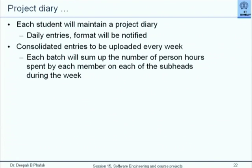At the end of the project, summing up all minutes and hours per activity across team members tells you the total person-days of effort spent. You'll realize that programming constitutes only a small percentage of total effort when building an industry-grade system. This quantification is essential because marks will be awarded not only on the quality of the program but on the effort put in. This year, unlike last year when diaries were submitted only at the end and arrived 'beautifully constructed' and hypothetical, consolidated entries must be uploaded every week to ensure authentic recording.